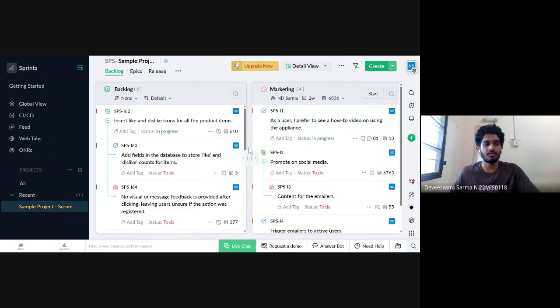And then comes the sprint retrospective. It is a private meeting with the developers about how we can improve our working. If we faced some issues regarding development, we can discuss them in the retrospective meeting so that they are rectified for the next sprint and the process will be faster. So now the sprint is completed. That's it. After that, we can see the other features like charts.